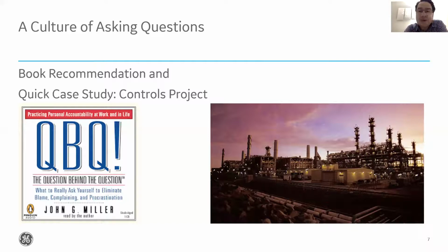We went back to the customer about a week later. Well, it's going to cost your $200,000 job. If you want us to do this, we need another $100,000. It's going to cost 50% more, but we can do it. Two hours later, we got the email from the oil company. Yes, that's amazing. Thank you. You're the best. Here's our acceptance of the $300,000 job. And we did the job. We did fine money-wise, and we got our first job with the Abu Dhabi Oil Company.